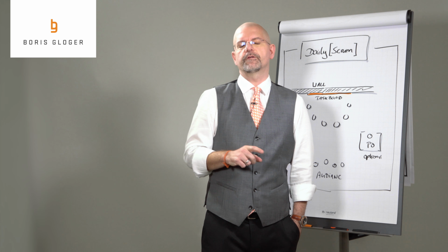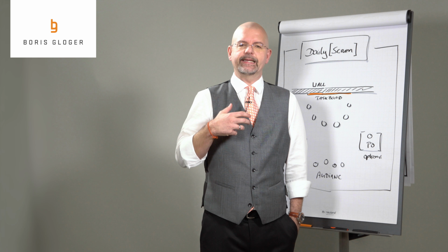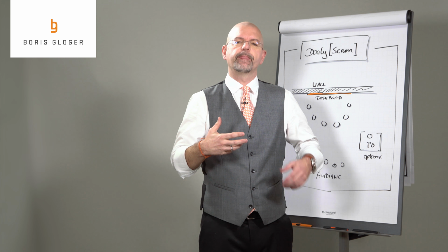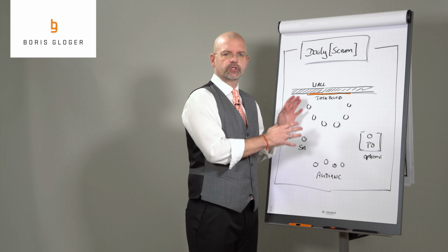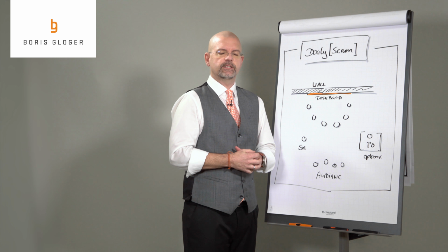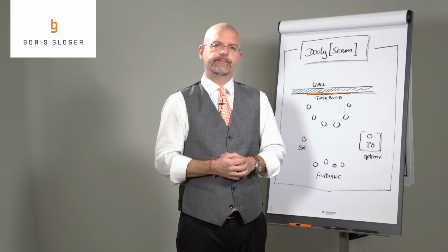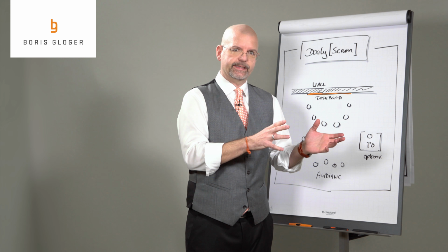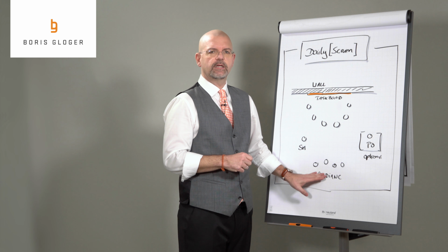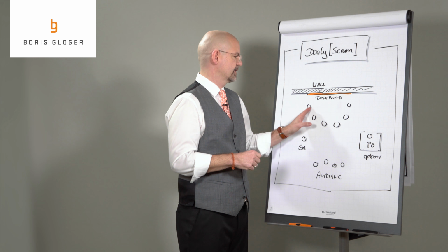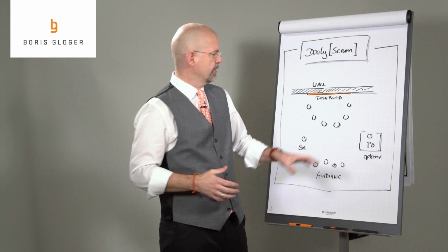Some aspect that is not so often mentioned in the discussion of the dailies is that it's a public meeting. So everybody in the whole company can attend or is allowed to attend these meetings to see the progress of the team. But the audience and even the product owner are not allowed to interfere with the discussions in front of the taskboard.